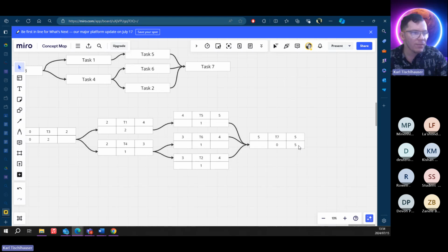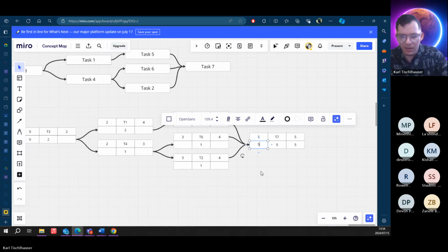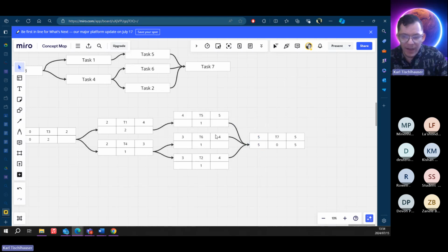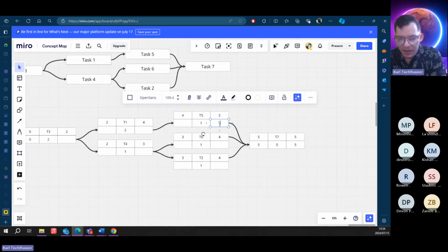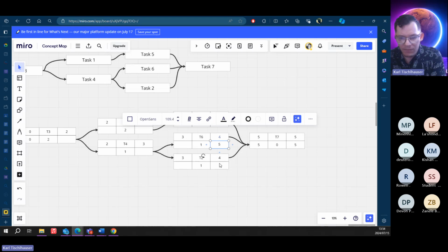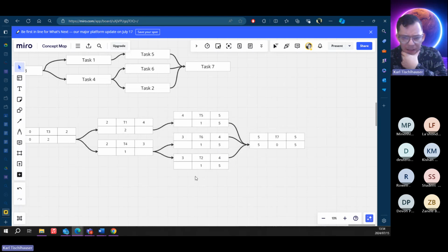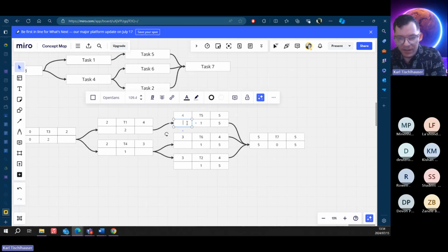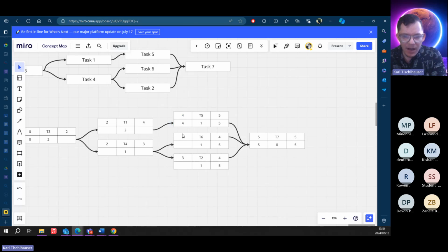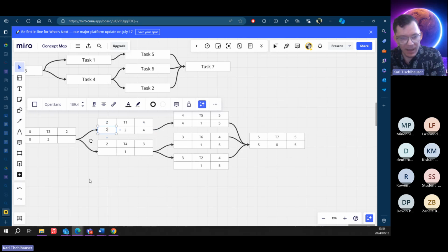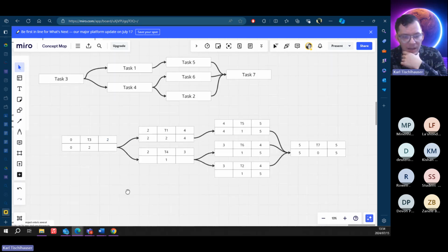Then when you go back, it's all about subtraction. Okay, so 5 minus 0 is 5. Okay, then you plug the 5 back in all of them. So 5 will come here, 5 will come here, 5 will come here. Okay, then we say 5 minus 1 is 4, so that's pretty standard, it's exactly the same. And the 4 will go back. You'll see that this will go exactly back the same way it came from the other way.